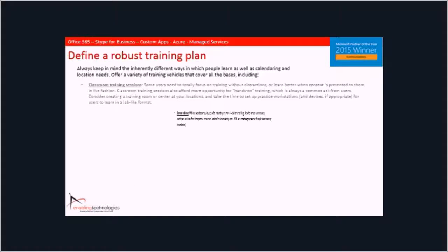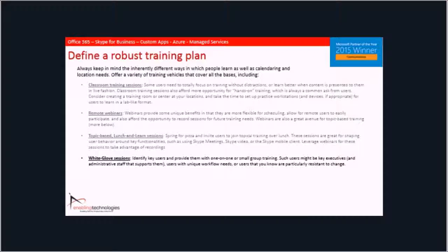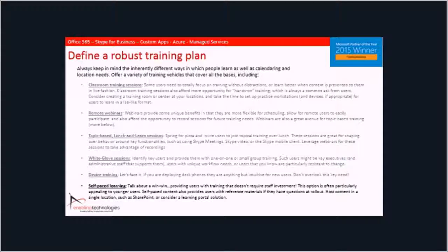You're also going to want to define a robust training plan, right? It's not a one-size-fits-all story. You're going to want to have some classroom sessions. You're going to want to incorporate remote webinars. You may want to have some brown bags, right? Bring in a pizza, have some lunch and learn sessions. You're quite likely going to need some white glove for the executives, or arguably even more importantly, executive assistants in the organization, just because they have unique workflows. Don't forget device training, right? If this is a Skype for Business voice story, you're going to want to have structured sessions around the headsets or handsets that you're planning. And don't discount the importance of self-paced learning.